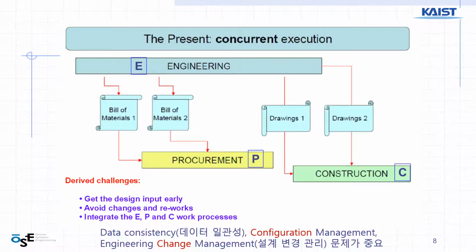The later stages start earlier than before. Right? So bill of material should be coming multiple times because design is going on and procurement is already started. So bill of material coming in series of set of purchase.